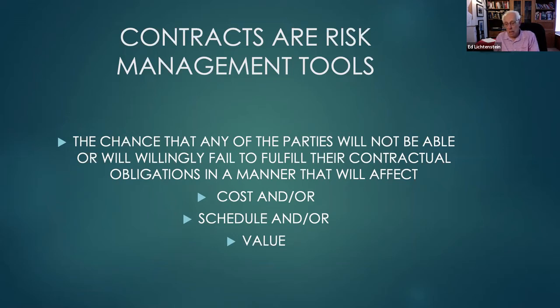There may be a risk mitigation strategy in that you create a schedule that gives you what's called float. You're not going to do a just-in-time schedule. You're going to do a just-in-time plus some extra time, because even the most simple contract, something can go wrong.